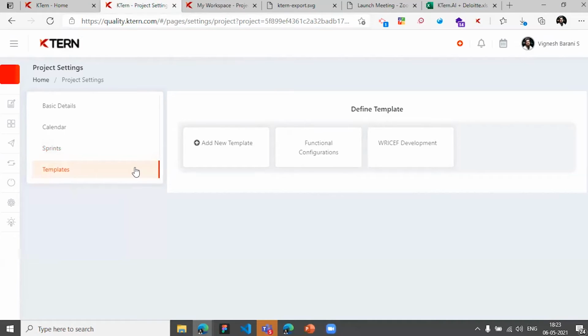let's take the RICEFW tracker. SAP published a single Excel template which we call the RICEFW tracker, and it goes to the column of AA, like 27 different columns about what the RICEFW object is, which process it is linked to, which user story it was linked to, who's the stakeholder, when was the FS specification date, TS specification date, coding date, unit testing date, training date, when is it delivered as part of that particular object.